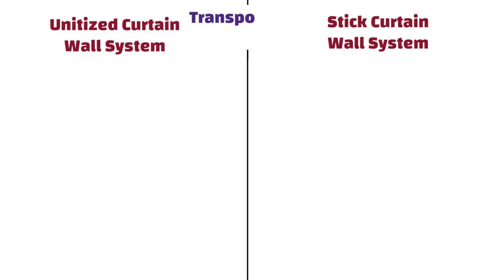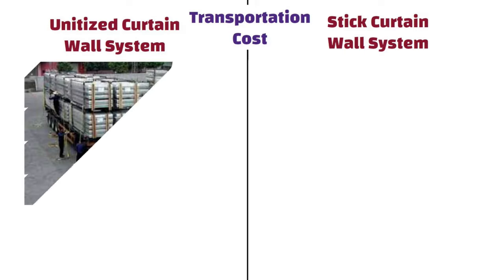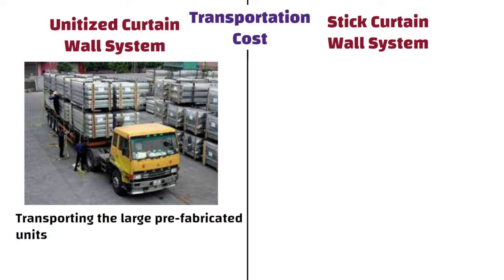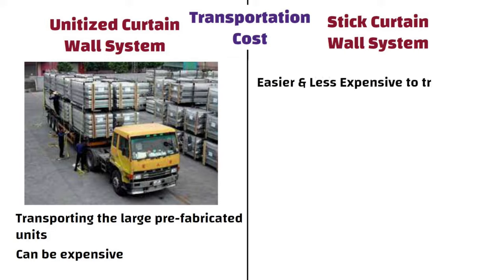Transportation Cost: In the case of a unitized system, transporting the large prefabricated units to the construction site can be expensive. While the stick curtain wall system is easier and less expensive to transport because its parts are smaller.